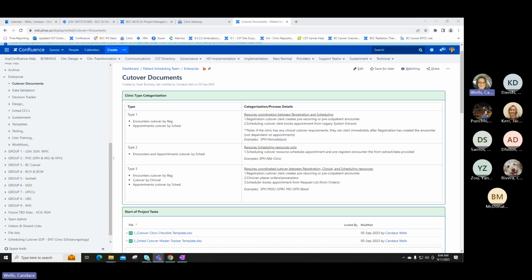So we have that generic queue, and it gets turned on. What we do is look at which clinics are going to need to scan and use work queue monitor during cutover, and you spread it out. You have clinic one complete their work queue monitor referrals and work tasks with it, and then you move on to another group. That way it keeps it very clean. Does that help, B? Okay, very good. Thank you, B. What other questions do we have?